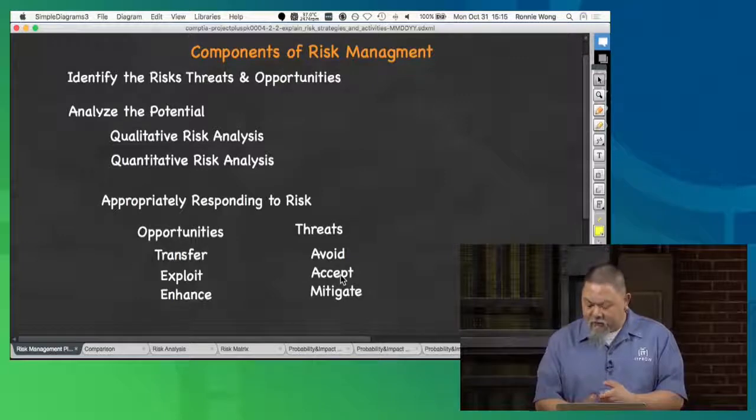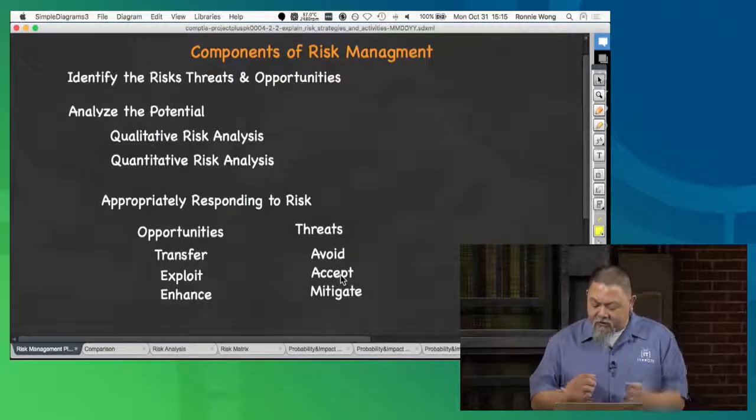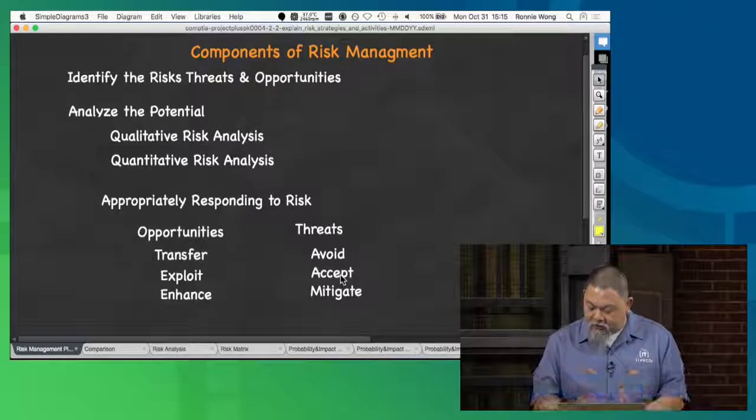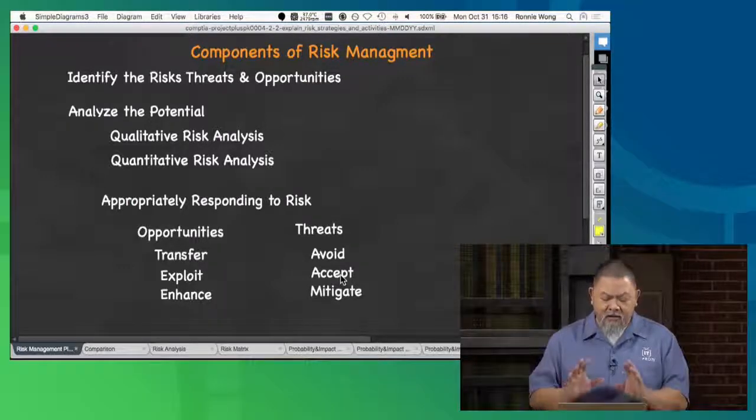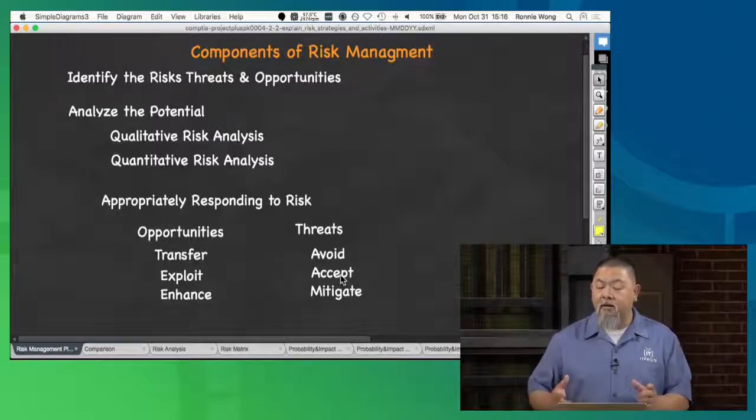So with the idea of avoidance here, you may just say, in terms of avoiding, you don't deal with the risk. You say, I didn't deal with it, but we'll accept it as it comes along. So let's give a very realistic example of something that may happen on a project site. You say, look, we've tried within a 100-mile radius to rent every single generator that will give me 50,000 volts or watts or above, and there's none available. They can't be here in time for when we need them. So instead, you just say, okay, if power goes out, it goes out, and that's what you have.